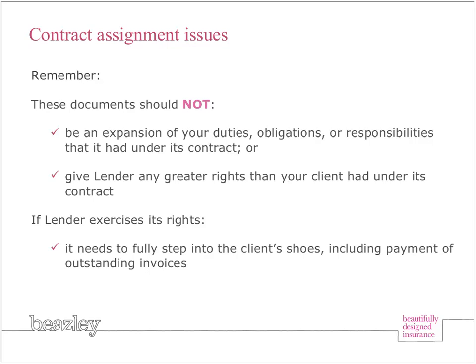And then one of the biggest issues is making sure you've been paid. The lender, if it's going to take this over, needs to fully step into your client's shoes, including paying you if you're not up to date on your payment. Very often, language in these assignment docs will say that the lender doesn't have any obligation to pay you for outstanding invoices.